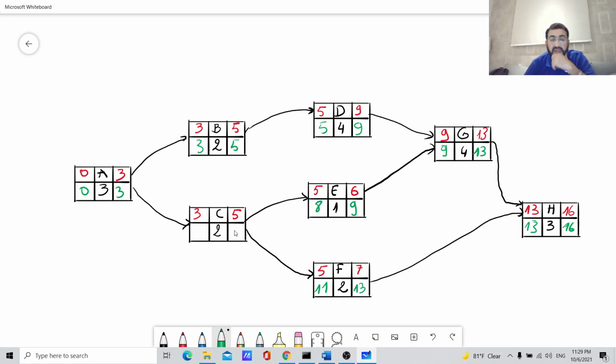Now here, this task, when should it finish at last? It has to finish before or maximum at day 8. Otherwise, if it finishes later, let's say for example day 9, it will delay this task. Okay, so it will not delay this task, but it will delay this one. So we need to take the minimum here. So here we'll write 8. 8 minus 2 is 6.